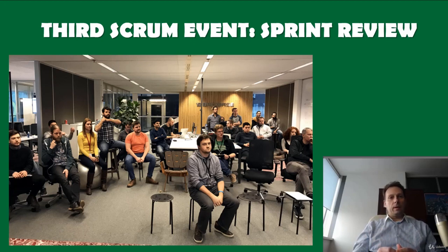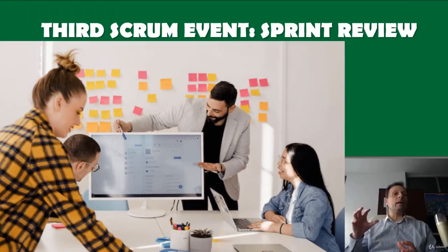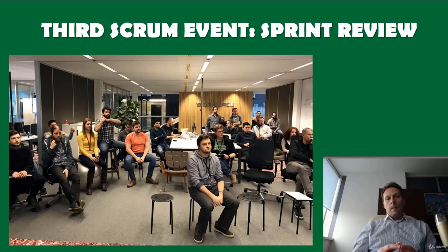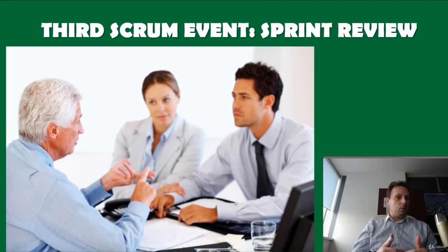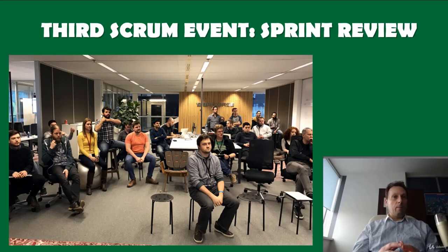Another important but often overlooked aspect of the review is to have working software. The point of the review is to get feedback from the customer and end user. If the software isn't tested and working, then it's not possible to start this important feedback loop. Remember, the review does include a demonstration, but the focus should be conversation. Now let's see the structure and agenda of the Sprint Review.